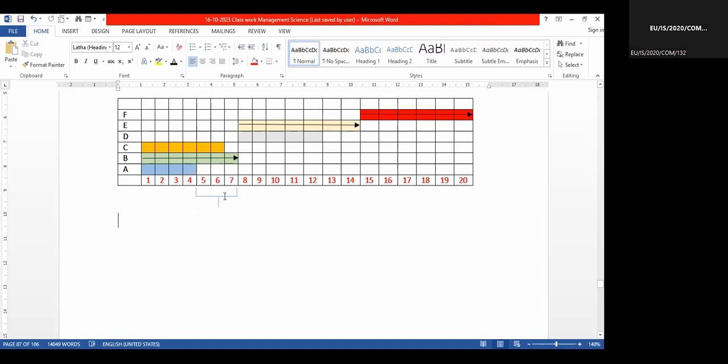Okay, did you get the point? Because after A and B complete only, D can start and E can start. So therefore we can delay 3 days.